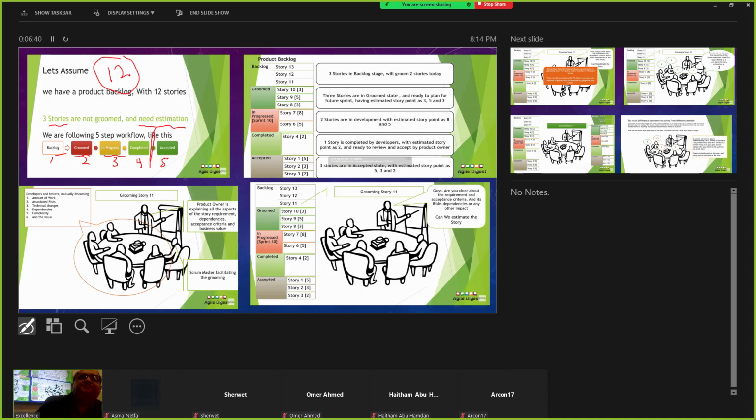Cool. Here, guys, we usually estimate something we call in Agile the rate of accepted stories. How many accepted stories versus how many completed ones? Because what I care for is not only what I have completed, but what has gotten approved so I can move forward or close my project. And then you get that acceptance rate, so you know your velocity as a scrum master, a product owner, and a project manager for the agile. Knowing your velocity, how many accepted user stories versus what is remaining, you will know how long you need, correct? Go ahead, please.